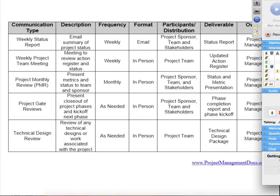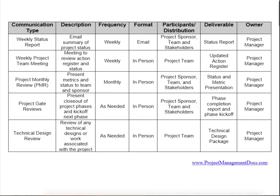The columns in the communications matrix are: communication type, a description of what that is — are we meeting via email, via Skype, in a particular conference room? — what's the frequency, what's the format, who are the participants, and what's the deliverable. For the weekly status report, you need to create a status report ahead of time and distribute it to all meeting participants beforehand, and the owner is going to be you. Making sure everybody understands and agrees to the communication expectations up front makes your job really easy to facilitate that communication.